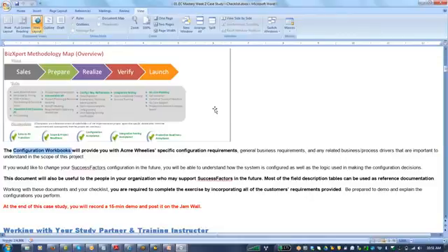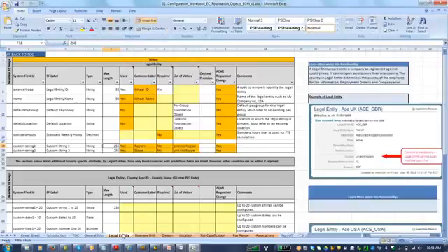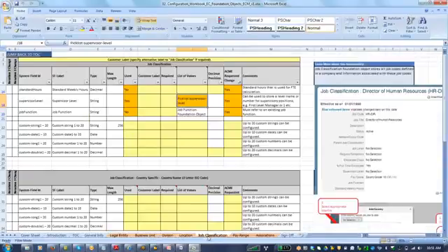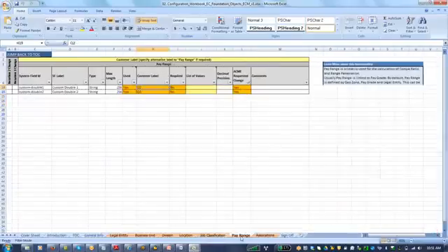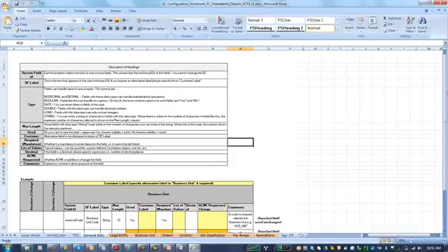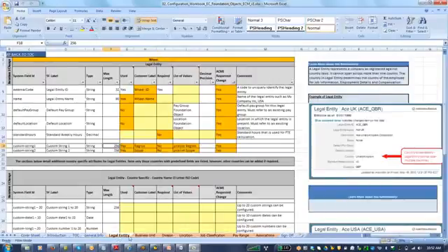So these are the different objects, and then you also have to come up with the security matrix. What are the different roles? What are the different groups? What are the different permissions? In detail, who, with different roles, will be accessing what. So you have to capture everything in detail, including the different pick lists, and you have to take the sign off. Only after taking the sign off will you proceed to the realization phase.